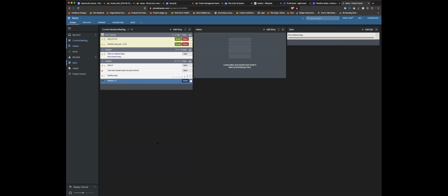So you're defining the dates. I define the date for the release, yes. And then it will tell me everything that will fit in that date based on my velocity. So is that what's happening with the dates on the right? The April 27th and so on, are you defining those dates, or is it defining those dates based on the weight and the team velocity? It defines these dates because these are what I set in my settings over here